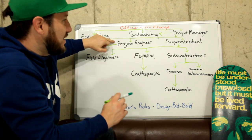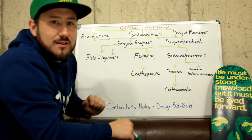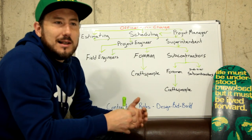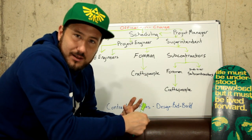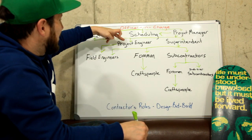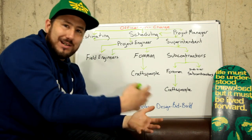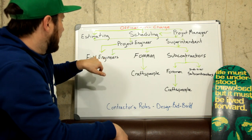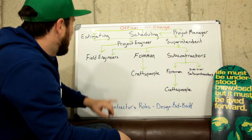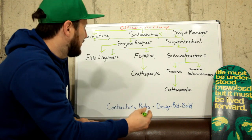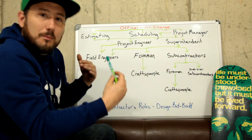The project engineer won't be on site. The project engineer is in the office and is responsible for all the structural and engineering work, all the testing and stuff like that. The project engineer will have field engineers that do site measurements and readings. Those field engineers will report back to the project engineer. Once in a while the project engineer might have to come in, but for the most part the field engineers are the ones on the ground, and they're not even on site full-time — they'll jump from site to site doing their portion of the build.